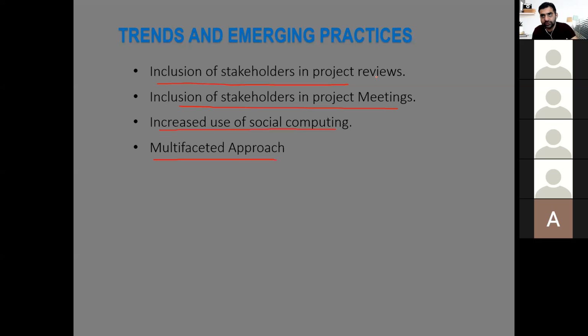Now we really don't submit our project deliverables at the end. House is ready, come and inspect it. No. Nowadays things have changed, especially in the Agile world, or projects that are run based on Agile, where deliverables are produced after each 2 weeks or 1 week, and the stakeholders review the deliverable at the end of each iteration. Much more frequent, much more often.